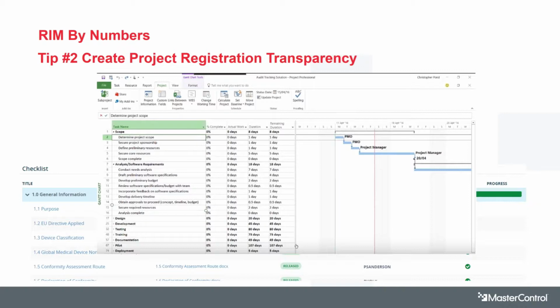So these are enterprise level projects, whether you're submitting an existing product into a new market or it's new product development, new product introduction. Your regulatory managers are going to be overburdened at over 3 to 5 projects. So at this point, you can predict slippage. You can predict that there are going to be errors, and then you get into the cost of these errors. So how is your organization managing this currently?